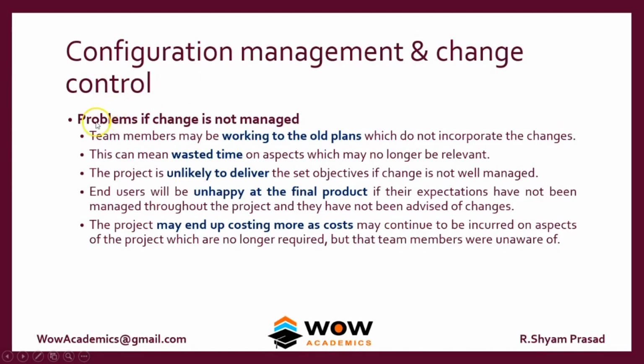So, problems if change is not managed properly. Team members may be working with the old plan. For example, version 6 is currently created, but people are still following version number 0. This can mean wasted time. So they are working on an old plan. The project is unlikely to deliver. Version 6 is what is actually required, but 0 is too old.